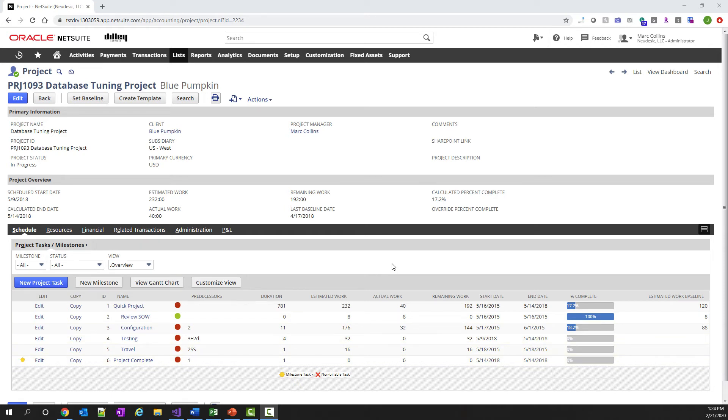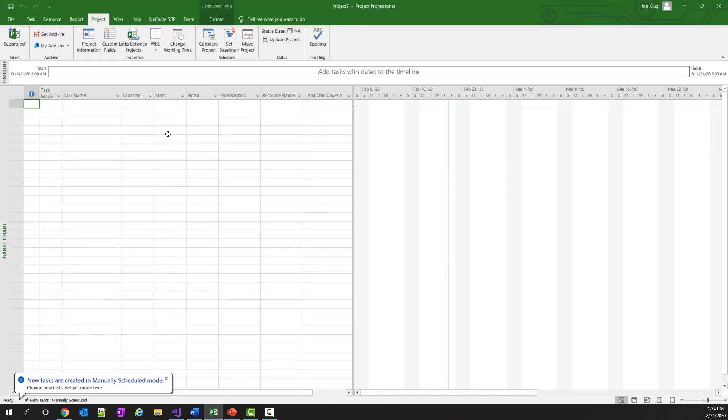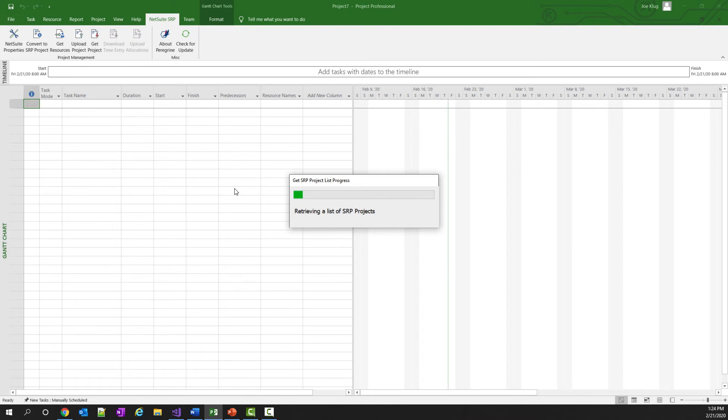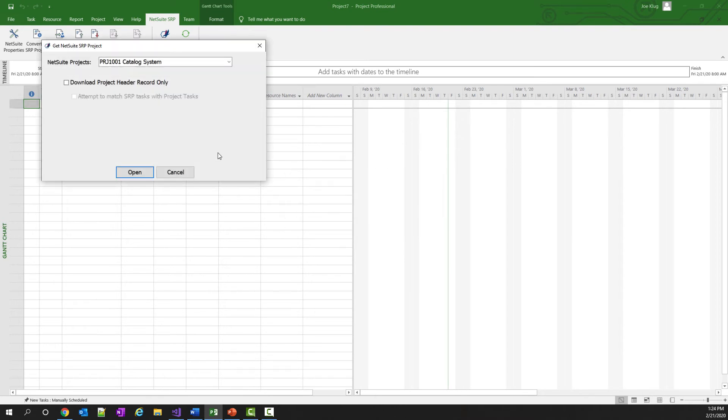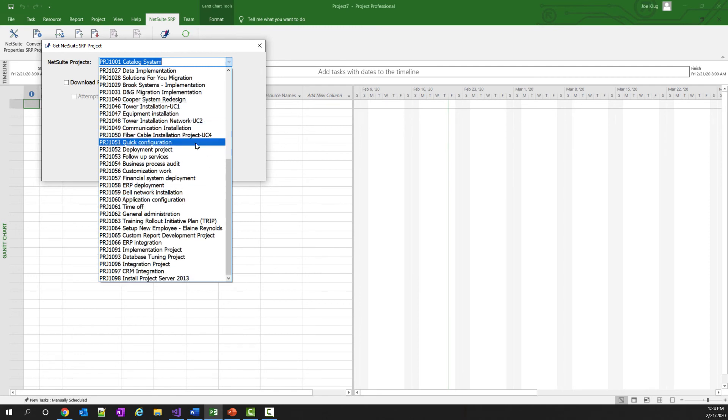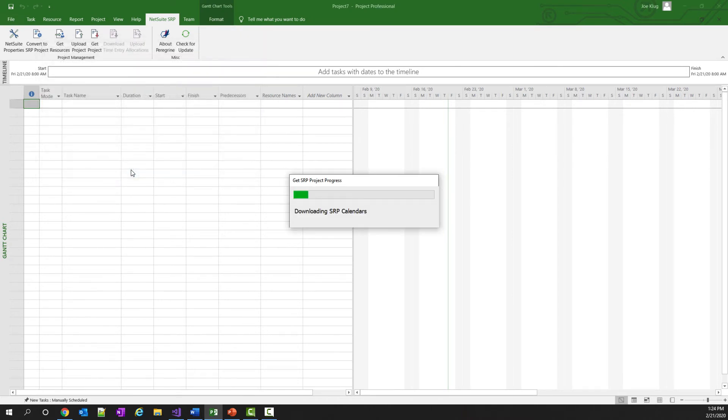Now, to download this project, the first thing you need to do is open a blank project in Microsoft Project. When a blank project is open, click on the NetSuite SRP tab and click on the Get Project button. A list of projects will be retrieved from NetSuite SRP that you can download. Scroll through the list and find the project you want to download. In my case, it's my database tuning project. Select it and then click open.